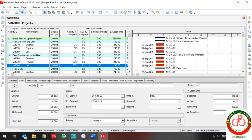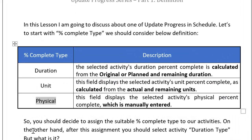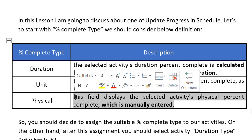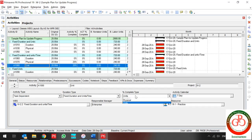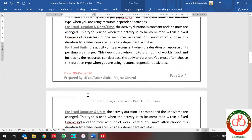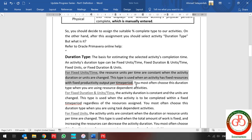If you change the percent complete type, the amount of labor unit updates automatically but the remaining does not change. When you want to update by Physical, it means you want to update manually. This is a very useful method in construction. We have three types of percent complete, and for duration type it depends on your activities.